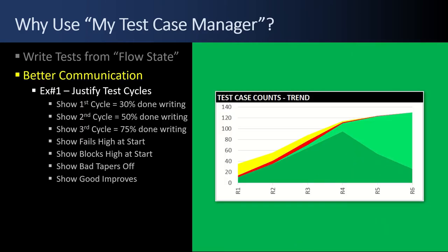Another reason to use MyTestCaseManager is for better communication. Example number one is to justify test cycles. Show that there's a first test cycle with 35 test cases and you're ultimately going to end up with 130. Show there's a second and third test cycle. Show that you're writing test cases as you get more functionality each sprint and as you get builds with more functionality and as you have time. Show how you're writing some cases, cutting a test cycle to run and execute those test cases. Justify that test cycles are important — testing is never one and done.